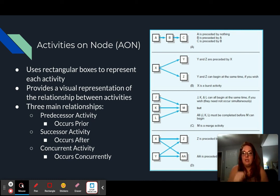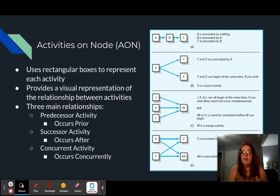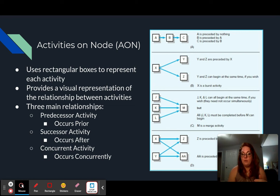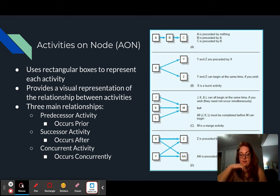If you look at the example from our book, looking at section A, there are activities A, B, and C — different work packages, different activities. A is preceded by nothing because there's nothing that happens before A, but B is then preceded by A, and C is then preceded by B. For concurrent activities — any activity that occurs at the same time — looking at section D, activity X and Y are occurring at the same time, and so are activity Z and double A. There's a little bit of crossover with every activity that you do in your project timeline.